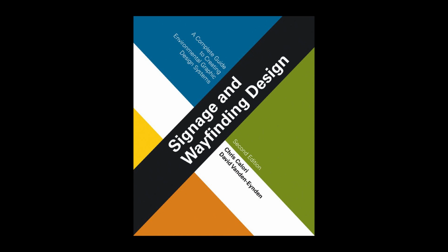Phase 5, Bidding, Post-Design. Finally, the project has been appropriately documented and the design work is done for all intents and purposes. Bidding is the first of 3 post-design phases in the overall design process, and it's the phase in which official binding prices are competitively obtained for the signed fabrication contract, and a bidder is selected for the contract. As with previous phases, the formality of the bidding phase depends on the project at hand.